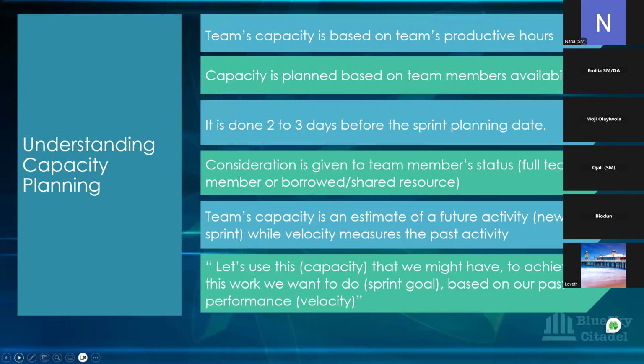And then another thing that needs to be considered is the team members' status in the team. Is this member a full team member, or is it a borrowed or shared resource? There are times when you have shared resources in a team. Let's assume you're working with data. You need the data people to be in the team. They might not be fully in your team. They might be in 3 different teams doing the same data analysis task.